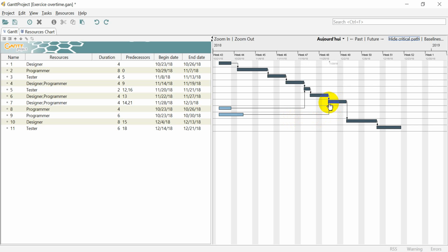And there is no predecessor of task 9. It means that we can move task 9 wherever between the beginning, but it has to be finished before the beginning of task 7. We don't want to move that because task 7 is part of our critical path, and if we delay the critical path, our project would be delayed. So task number 9 has a duration of 6 days.